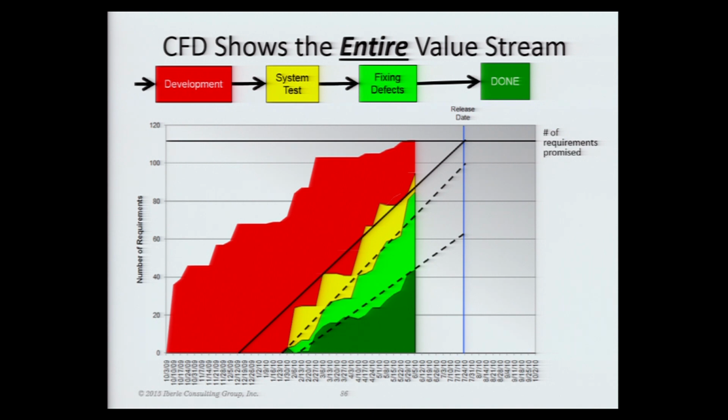But there's definitely feedback coming through these coaching meetings, and that's why you want them to be frequent, so new information keeps coming to the value stream owners, and from the value stream owner to the department manager, so that if the plan totally doesn't make sense, then let's say so and revise and have a different target condition.